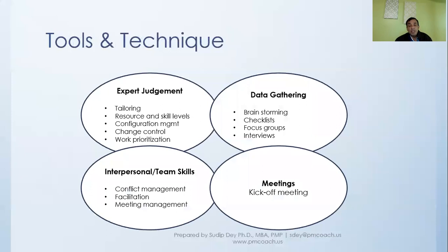And finally, in meetings, this is where you will have the kickoff meeting. Kickoff meeting is when the project now starts to go forward, so after the planning. You have to remember that in many organizations, kickoff meetings probably take place during the project charter, after the project charter. But for your PMP exam purpose, you should remember that the kickoff meeting takes place in project planning, develop project plan.